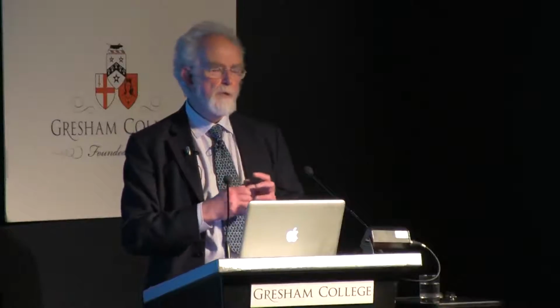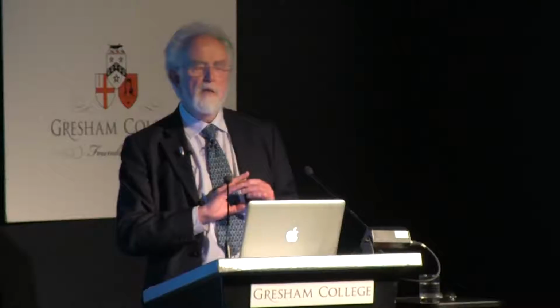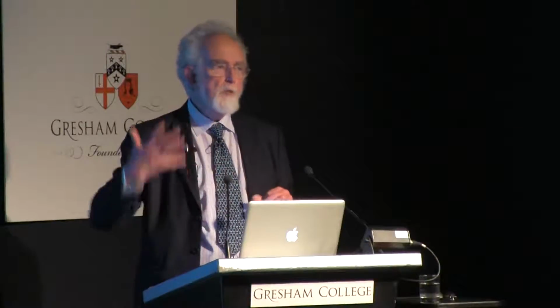And that's one of the reasons why, as we've seen in previous lectures, the average computer software development project overruns by of the order of 100% in time and cost. One of the underlying reasons is that the wrong problem is being solved, and it causes compromises that then cause delays, which then cost money.